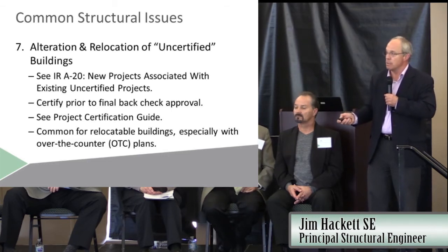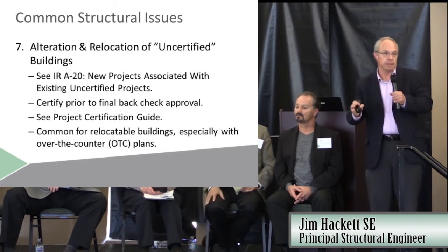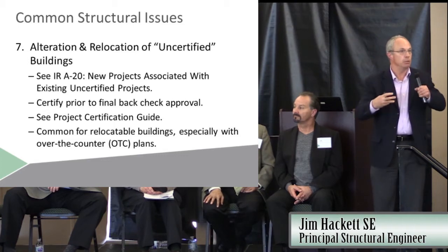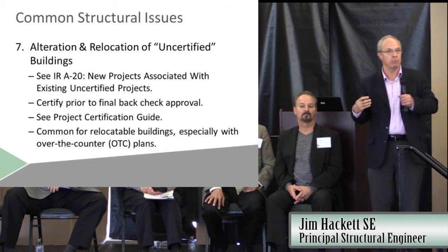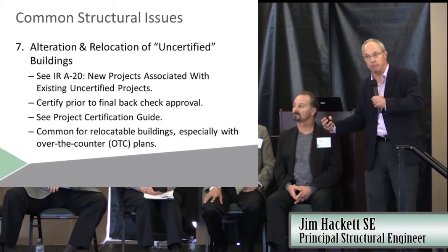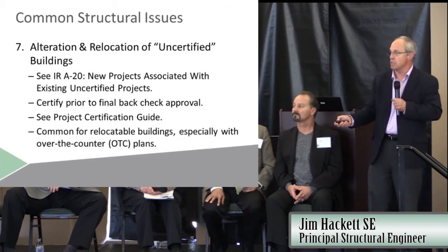You can also, if you have an uncertified building and you need to do a modernization, actually do the work in that new modernization that was causing it to remain uncertified before. So there are different things in here that make that a great IR.